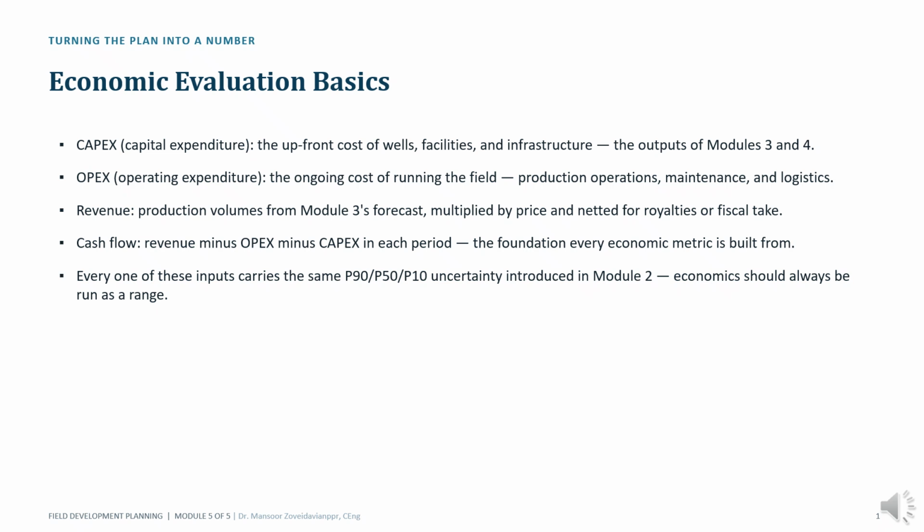Notice how every input originates from earlier modules. The wells plan drives drilling CAPEX. The facility concept drives infrastructure CAPEX. The production forecast drives revenue. Economics is where all previous technical work converges into a single measure of value. And just like reserves and production forecasts, economics should never be represented by a single number. Every case should carry uncertainty through to the financial outcome.